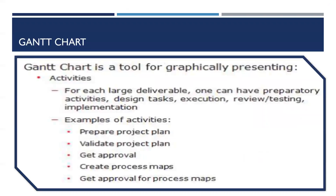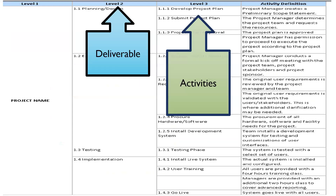For each large deliverable, you can have preparatory activities: design tasks, execution, review, testing, and implementation. Examples include: validate project plan, get approval, create process maps. In our table, the activity 'develop project plan' is under planning and design — so that deliverable is planning and design, and the activities are: develop project plan, submit project plan, and install development system.